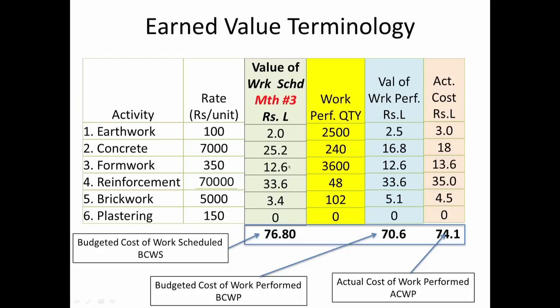For formwork and reinforcement, both are on what was originally planned — 12.6 and 33.6 as planned. Brickwork is also ahead. So while brickwork and earthwork are ahead, and formwork and reinforcement are on plan, we are really behind on concreting. This allows us to pinpoint that the concreting package is what is causing the project to fall behind schedule.